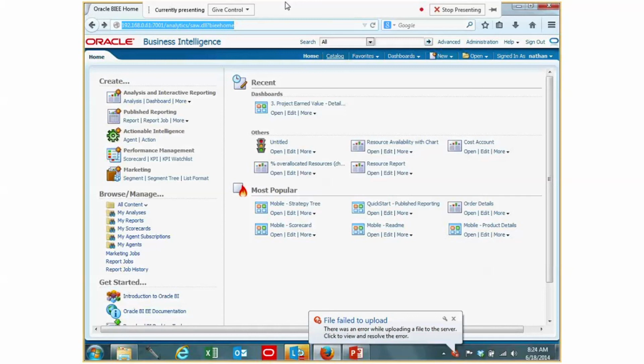I'll back up real quick and tell you some things that you might want to configure in your EPPM environment before you get there. If you have messed around with user access and permissions, you'll note there is a P6 Analytics box per user. If you want them to have access to that, you actually have to check that. I talked about the history that is involved in analytics as well. That's set up on a project-by-project basis and an activity-by-activity basis, if you want to change that to daily or however you want to toggle that. So there are several configurations that you need to set up in your EPPM environment for it to work correctly, or however you want it to work, once you get into P6 Analytics.